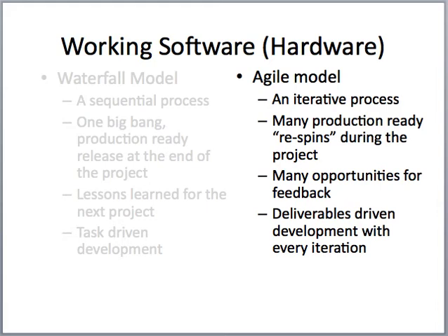The shorter time frame also provides opportunities, pardon me, for lessons learned as you go along, and feedback specifically from customers. It gives you the opportunity to add or remove or change requirements and product features as you go along, which incidentally is the kind of feature creep that hardware developers tend to not be overly open to in general. And here you see that type of feature creep actually built into the development model.